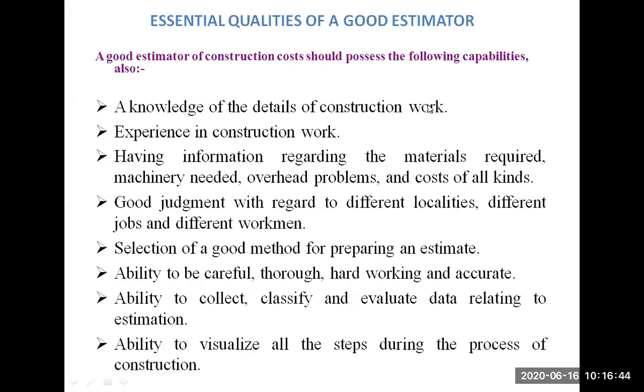For that particular work, we are going to prepare different steps. Those different steps are nothing but making a schedule of that particular day. For the next day, you need to prepare the schedule, for each and every day. That schedule includes any particular task which you are going to perform. Suppose in the morning session you are going to complete the excavation work, in the afternoon session some other work, staircase, it may be anything, in the evening session you are going to complete casting, that is preparing the concrete and then casting it in some part, that is at beam level or footing or any other work. So you need to schedule those activities step by step, day by day.